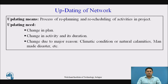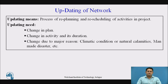Why do we go for network updating? If there is a change in the plan, we have to go for updating. If there is a change in the activities and their duration — such as the addition of some activities or a change in the execution method — the activity may be changed or added, along with a change in duration. These changes are due to major reasons like climatic conditions, natural calamities, or manmade disasters.